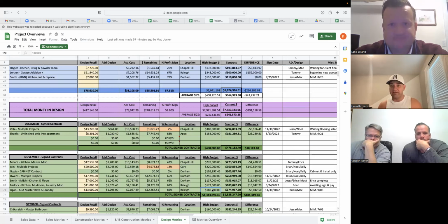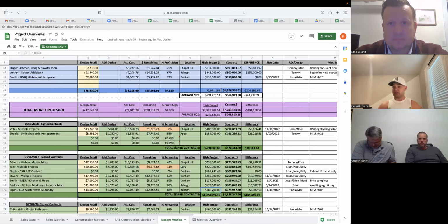They're like, okay, just design whatever. We just need to get it done. Well, if you get paid a percentage of GP, you're like, no, if it's more scope, we need more money. And obviously the resetting expectations keeps the client where, a lot of times they say, well, they don't realize how much they're actually adding to the job. And if you wait till the very end of the design and tell them, then you surprise them.